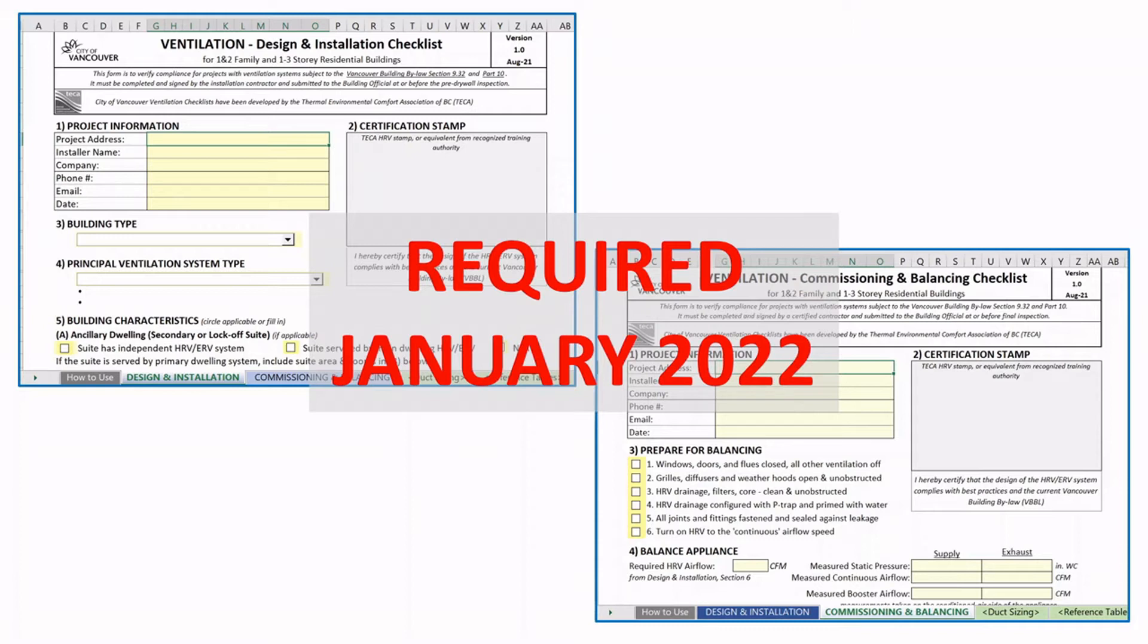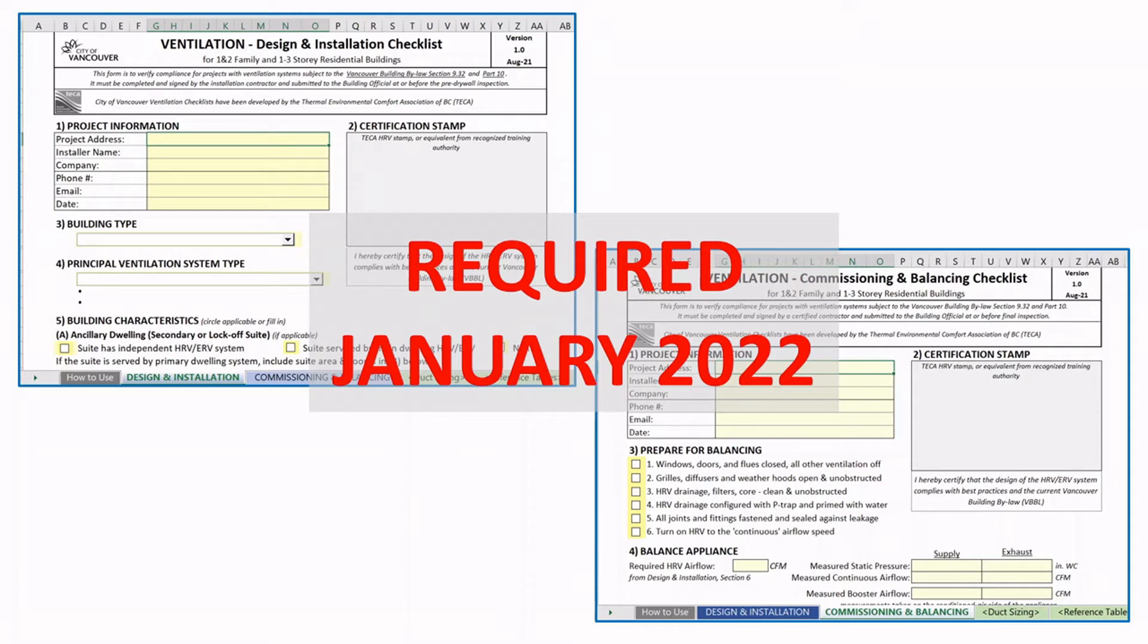At the Pre-Drywall Inspection, the Design and Installation Checklist has to be submitted to the Building Inspector. At the final stage, the Commissioning and Balancing Checklist is going to be inspected by the Building Inspector.